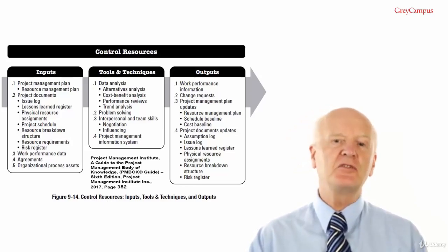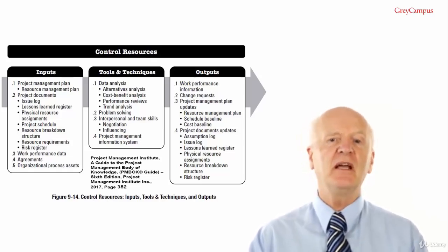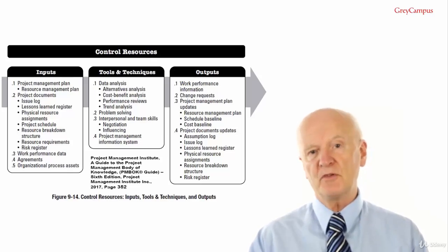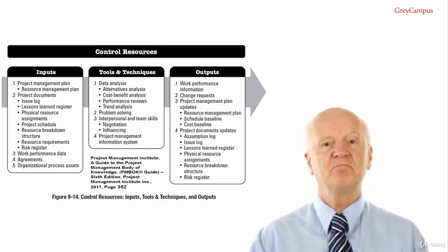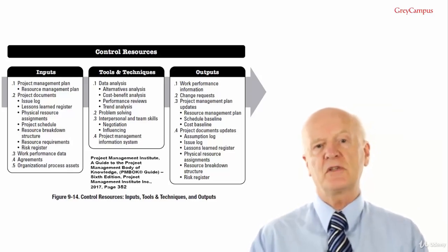The project manager should use methodical steps to deal with problem solving. These can include: identify the problem, define the problem. This means break it into smaller, manageable problems if possible. Investigate. This means collecting data. And analyse. Find the root cause of the problem.